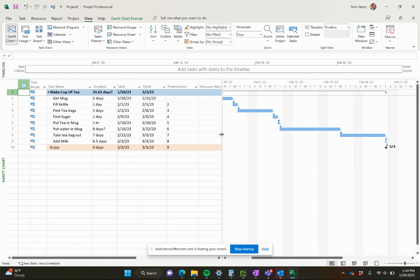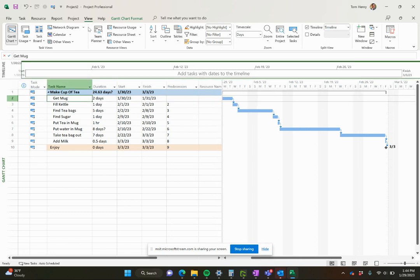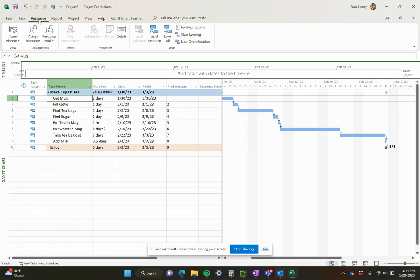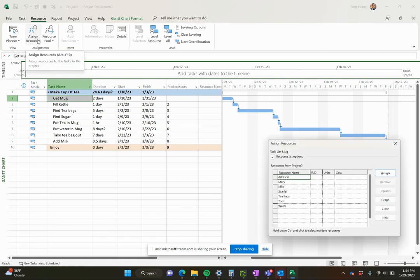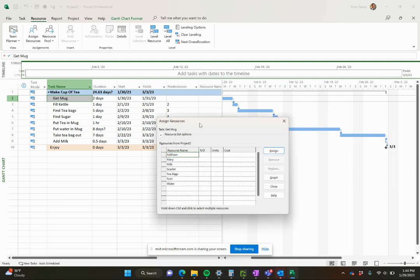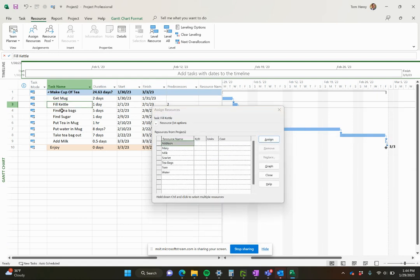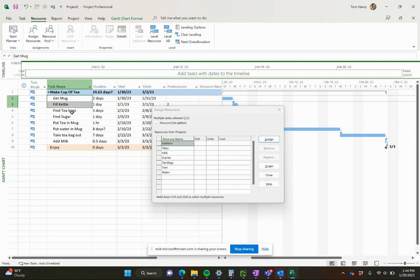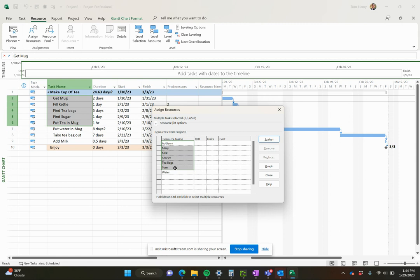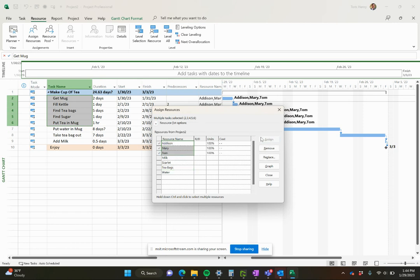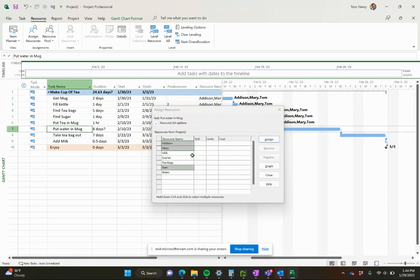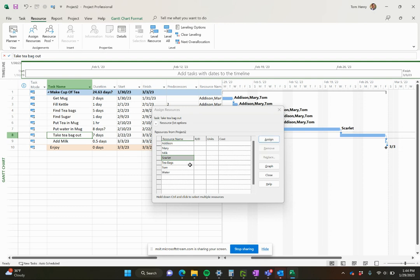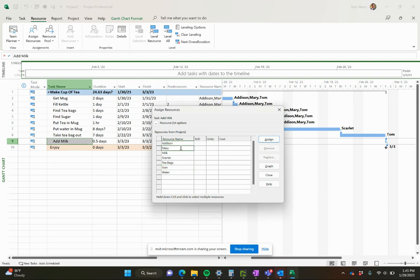So now we go back to the Gantt chart. Now we've got our project fully ready to be resourced. Get the mug - who's going to work on that? My favorite way of doing this, and I have a video on resource management in Microsoft Project, I'm just going to click on assign resources here. I love this dialogue. You can move it around, you can click behind it, and it still shows up. Very rare that you get that in Windows. But you can come in the background, select these five tasks, and I'm going to assign Mary and Tom, holding down the control key, and Addison, then click assign. Now I've assigned multiple resources to multiple tasks in one shot. Make that really easy. Put the water in the mug, maybe put Scarlet on that one. Take the teabag out, Tom can do that one as well, and add the milk will probably be Addison. She likes adding the milk. You get the idea.